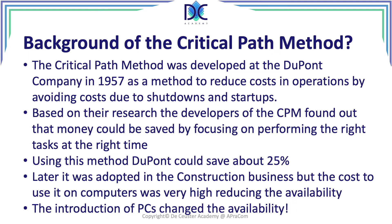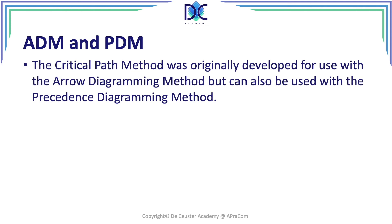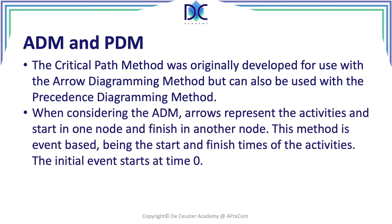The critical path method can use two scheduling approaches. Originally CPM was developed with the Arrow Diagramming Method (ADM), where arrows represent activities starting in one node and finishing in another. Those nodes act as milestones — a start milestone and a finish milestone for each activity. The Precedence Diagramming Method (PDM) also exists, and both methods were developed roughly in parallel, with practitioners having personal preferences for one or the other.